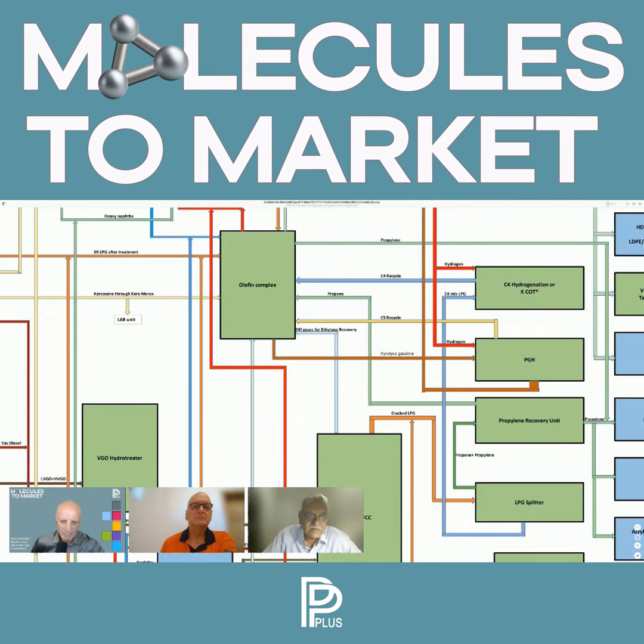Actually, licensors don't do this work. Licensors actually do only technology work. They do not like to do basic engineering work. Basic engineering, often they leave it to the consultant. But our experience is this interface is very troublesome between the licensor and consultant. So if these 4 or 5 activities which I am going to tell now are also performed by the licensor, the responsibility remains with the licensor, maybe he can subcontract it to a consultant if he wishes to.